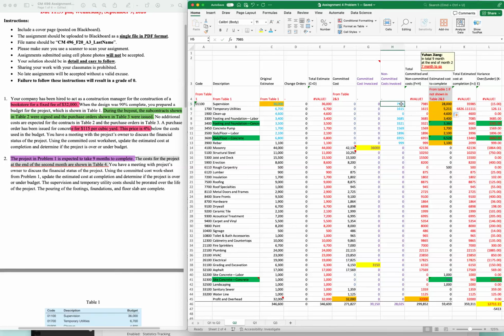But if you come from here, you will see this number has already happened. It's about this money, right? And this money actually is lower than the original, because for the original here we can do a quick calculation. That will be equal to this one divided by 9 and then times 2, because you already did 2 months. So it will be 8,000, right? But here it is a little bit slower than 8,000. So we do the same thing for all of them.